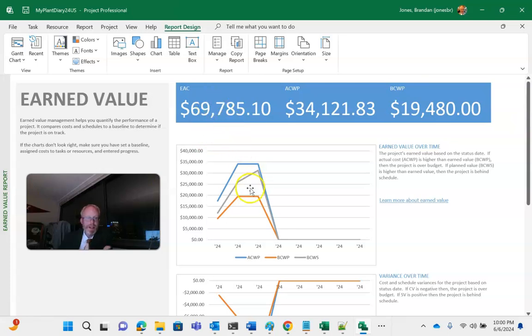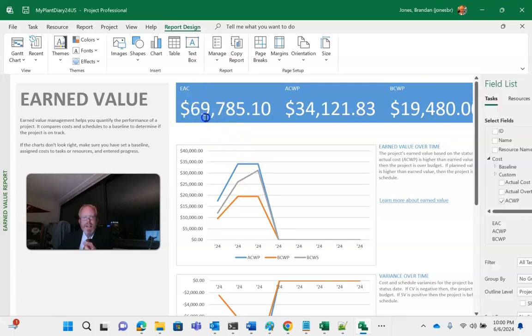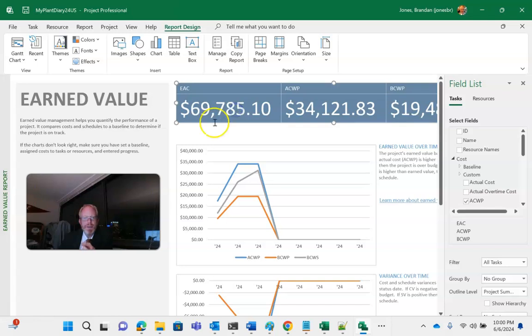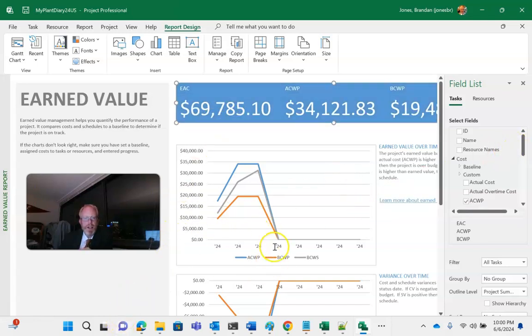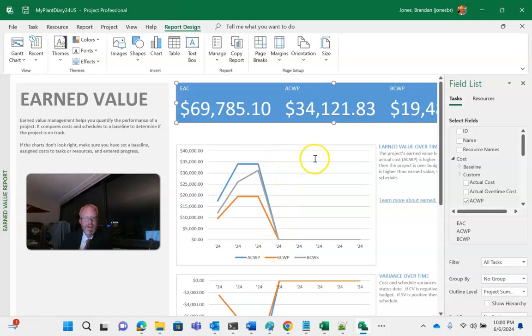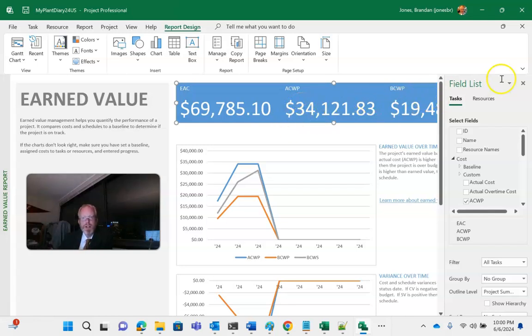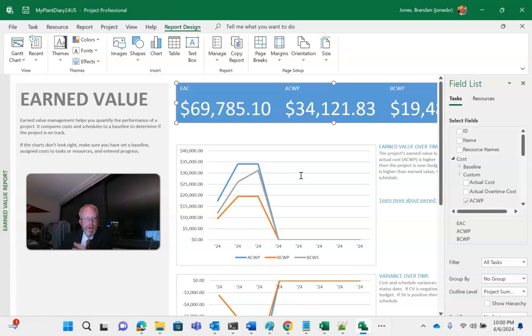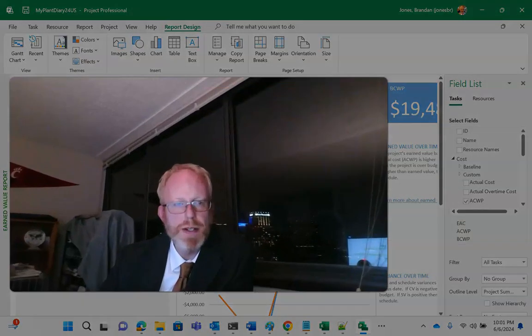Up at the top, if you don't like graphs, we have the raw numbers. Estimate at completion. So that's going to take our cost performance index and multiply it by our budget and let us know here's what we think it's going to cost. Actual cost of work performed. How much have we outlaid? Budgeted cost of work performed means what's the value of work we delivered based on our original schedule and budget.